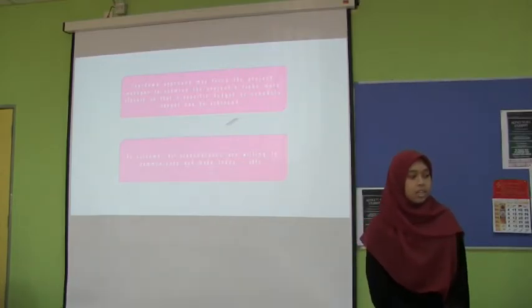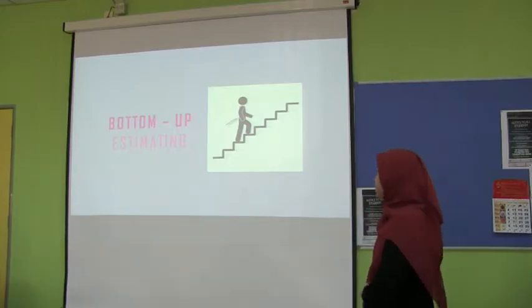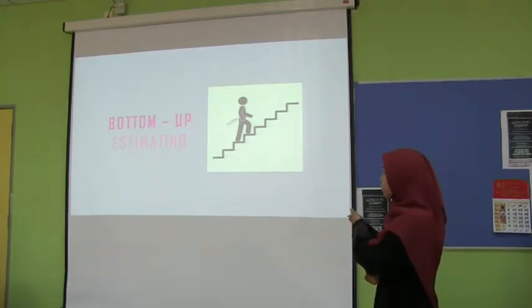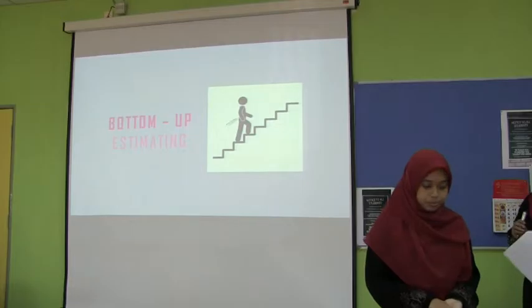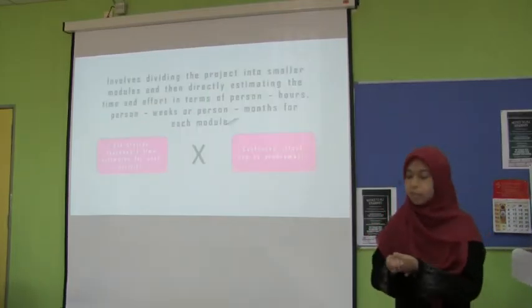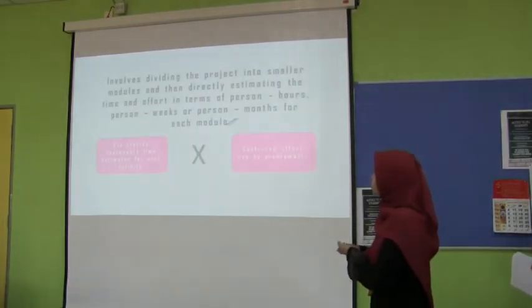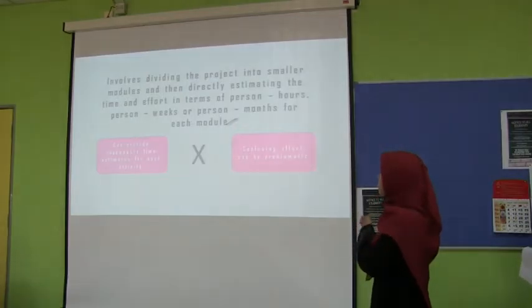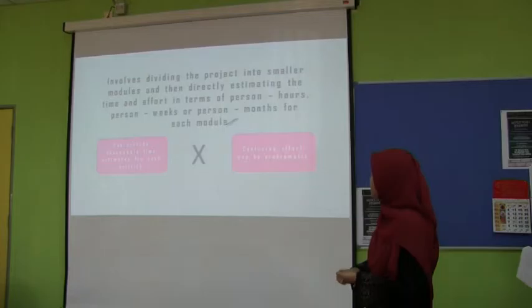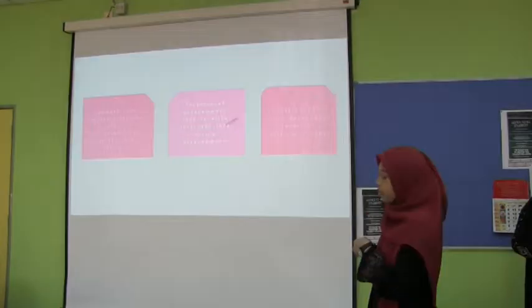Next, most real-world estimating is made up by using bottom-up estimating. Bottom-up estimating involves dividing the project into smaller modules and then directly estimating the time and effort in terms of person-hours, person-weeks, and person-months for each module.